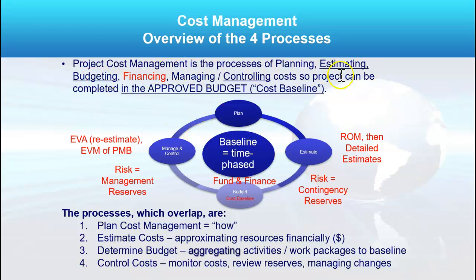So this slide is focused on the circle here. This is really just the definition of planning cost management, where we want to estimate, then budget, then finance, and then of course control this approved budget, which we call in project management a cost baseline. And the cost baseline becomes this time-phased budget.